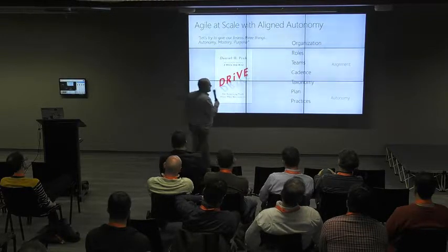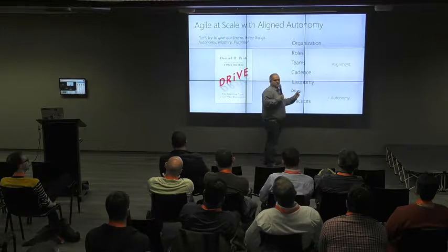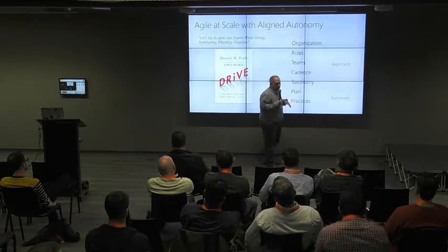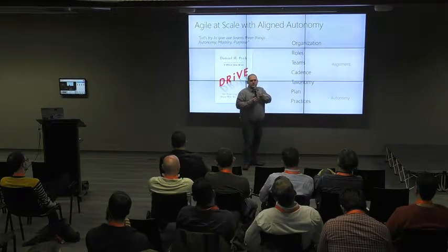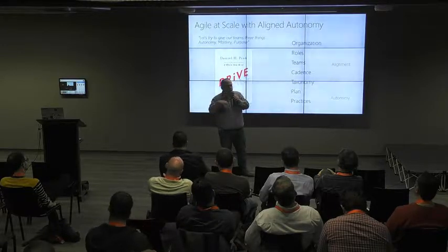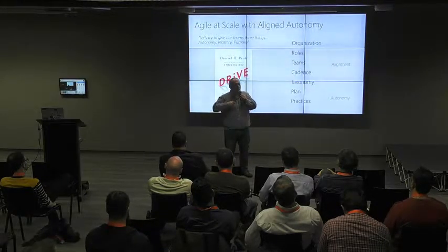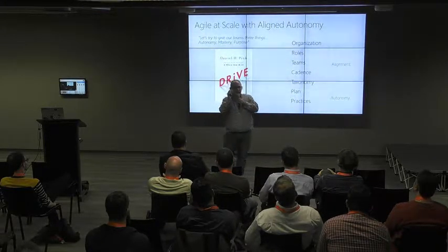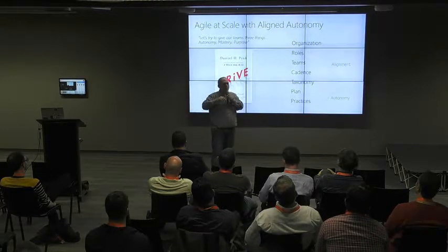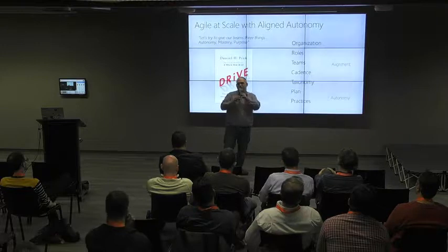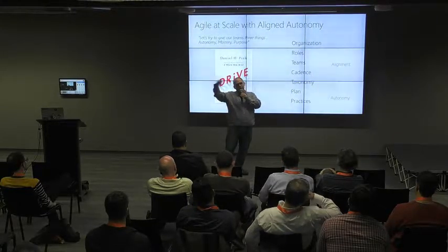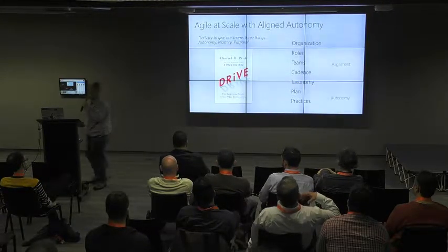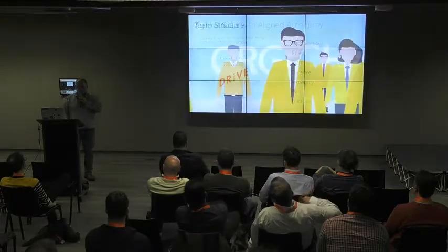When we first started doing Agile, cadence was in the autonomy section. You could do whatever sprint length you wanted. You could have whatever sprints you needed, call them whatever you wanted, which was cool, but it turns out the lack of a heartbeat was really confusing for working between teams and that coordination. In the old days when you used to have to defrag spinning rust hard drives, you'd end up with these gaps between sectors that you have to defrag all the time. When you have teams working on different sprints that end at different times, there'd always be these delays when you're waiting on a dependency and things like that. So we just found it worked a lot better to have a regular heartbeat for the organization, and everybody kind of knows whereabouts everybody is in the cycle.